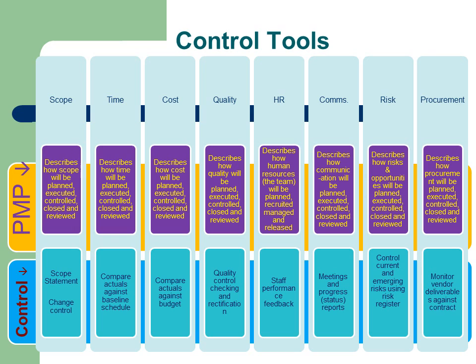The PMP describes the project procurement processes, and the procurement plan describes how each item will be procured. The contract associated with each procurement is the key control document. The project coordinator must ensure that each vendor is delivering goods or services according to the contract conditions.